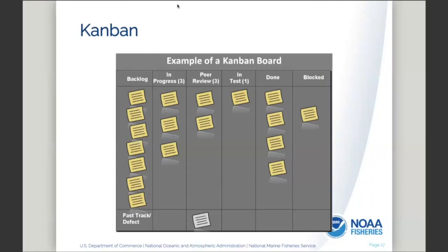So Kanban gets you that because the Kanban board is visualizing everything you have going on and helps you discipline yourself and the team in limiting what you're going to work on. So you have here all the millions of things you need to do. And then you have, okay, these are the things I'm working on now. And this number is what you allow for the work in progress.